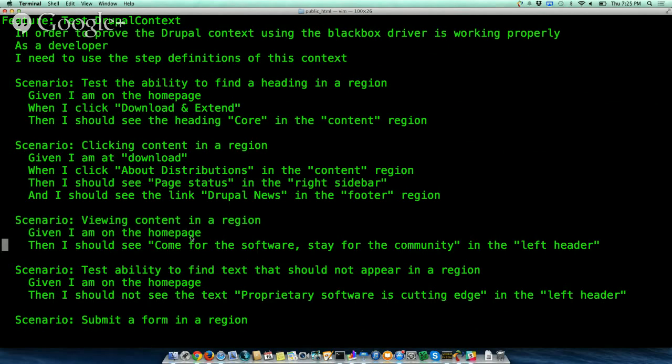Johnny Fox was telling me that he actually sits down and writes the tests for a project when they're working on the next iteration. They do agile development, and when they're planning their next code sprint and pull the user stories they're going to develop for that sprint, then he'll write the acceptance tests and commit those to the code repository. Then the developer working on that particular feature will pull the acceptance tests, and they start coding, and they run their feature tests, and they code, and they run their feature tests. And when all of those feature tests pass, they're done coding. They mark that particular feature set as complete and ready for review, and everything's committed back.